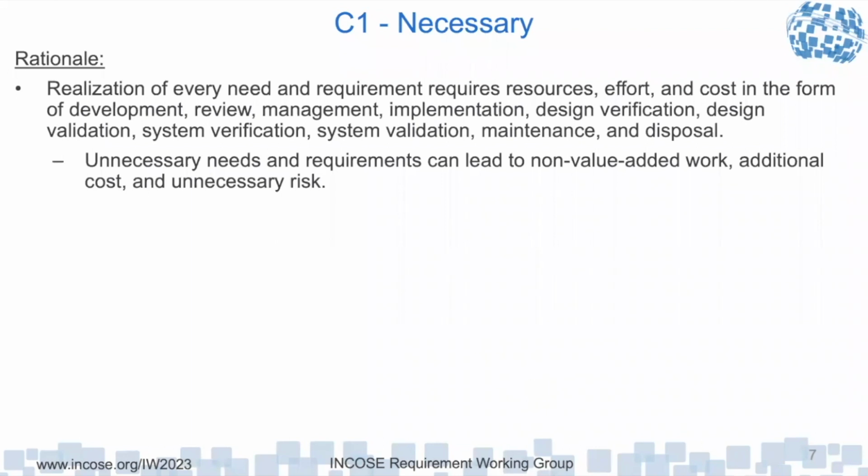So you could then do your verification against 105. Or in a value management contract, you could recognize the 105 as the bid, but then provide some value for 110 and 120. So the contractor could get the contracted figure for 100, or they could get a 10% bonus for getting to 110, a 20% bonus for 120. So what you do in your requirements really does rather depend on how you intend to manage the contract, and whether or not you intend to give contractors a stretch target or whether you would like them to just be verified against the amount that they actually bid.